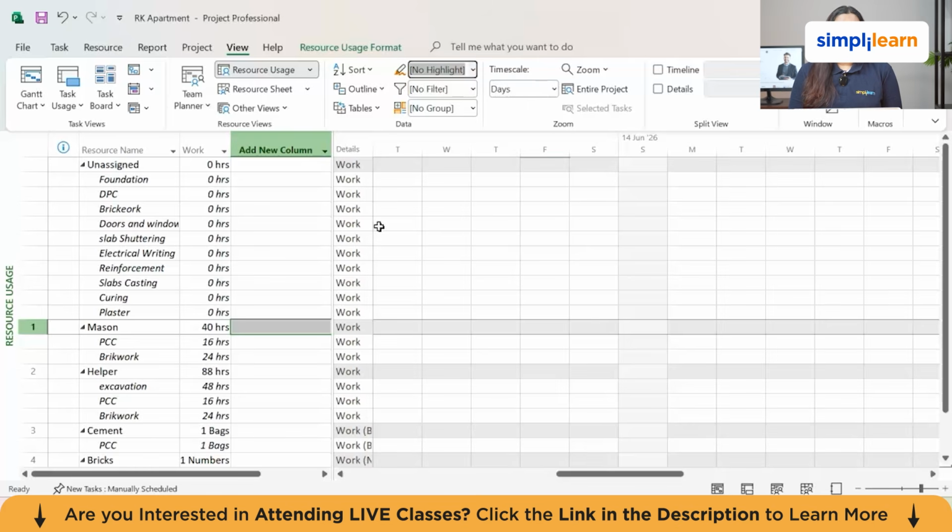Custom filter is where the real efficiency gain sits. Once you create a filter that shows all critical activities for a specific subcontractor due to start in the next 4 weeks, you can save it and apply it every week. The data updates automatically as the schedule is maintained. This is schedule communication that scales without adding manual effort.